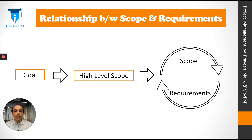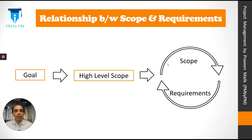So what's the relationship between scope and requirements? Initially a goal is defined and a high-level scope is prepared. Using the high-level scope, some initial requirements are defined and scope is elaborated further. The scope and requirements go in a cycle — as more and more requirements come in, scope is defined further.